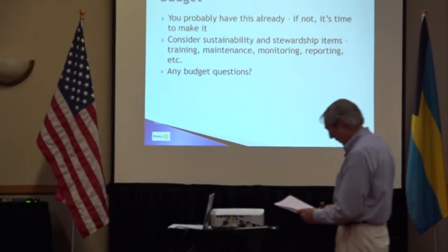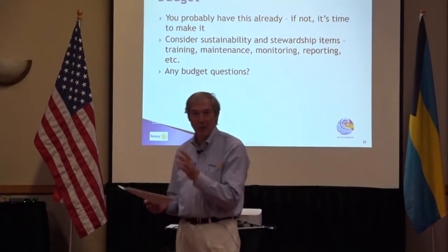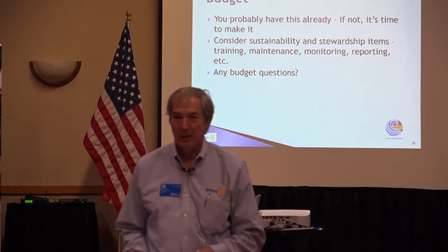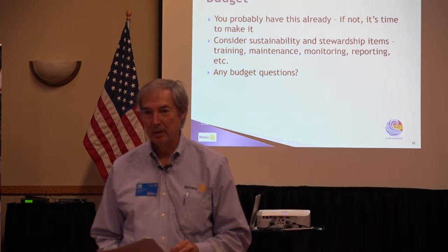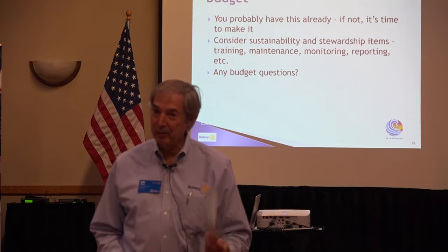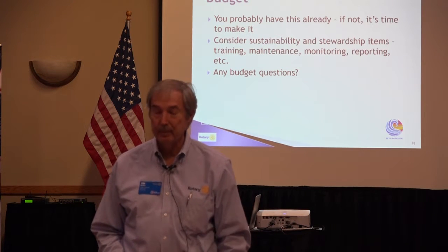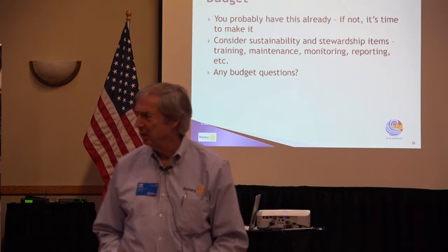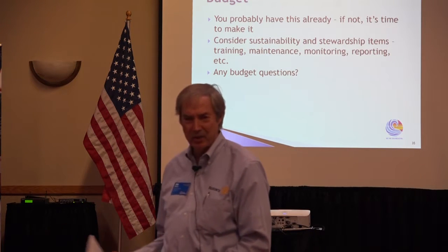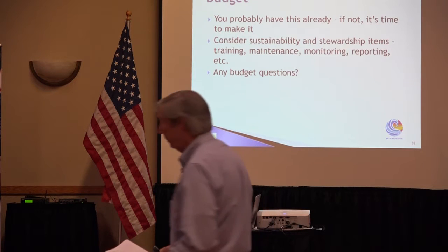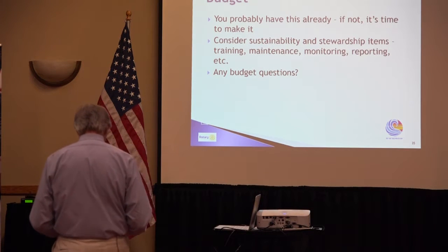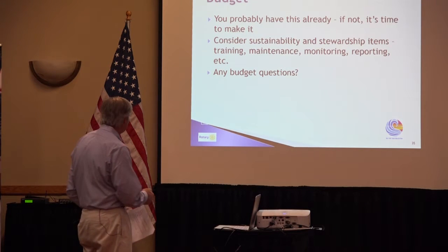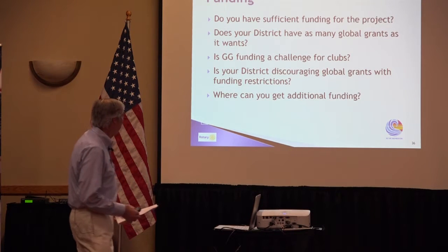Okay. So there's a budget section in here, and you're going to put this stuff in. How about budget contingency? You never have a project that always goes 100% like you think it will. You can have a contingency in your project. Contingency funding. I forget what it is now, but it might even be 20%. It's 15? Okay. It's a reasonable amount. That can be part of a lot of things. Okay. Funding. All right.